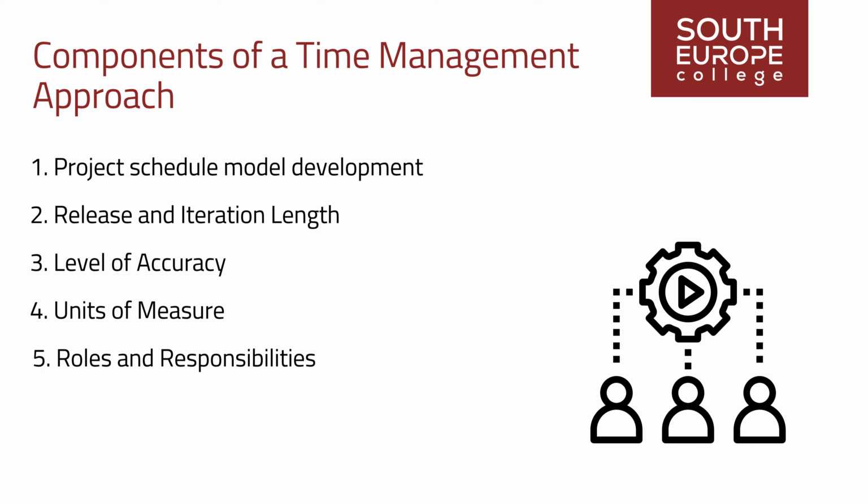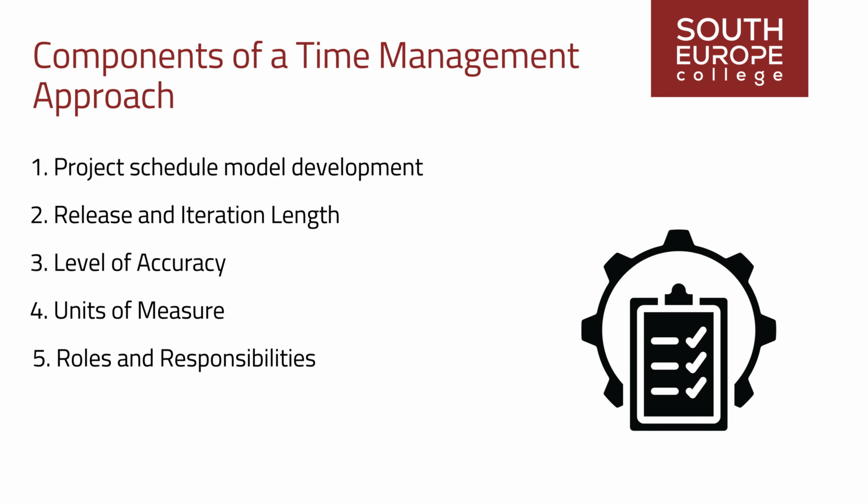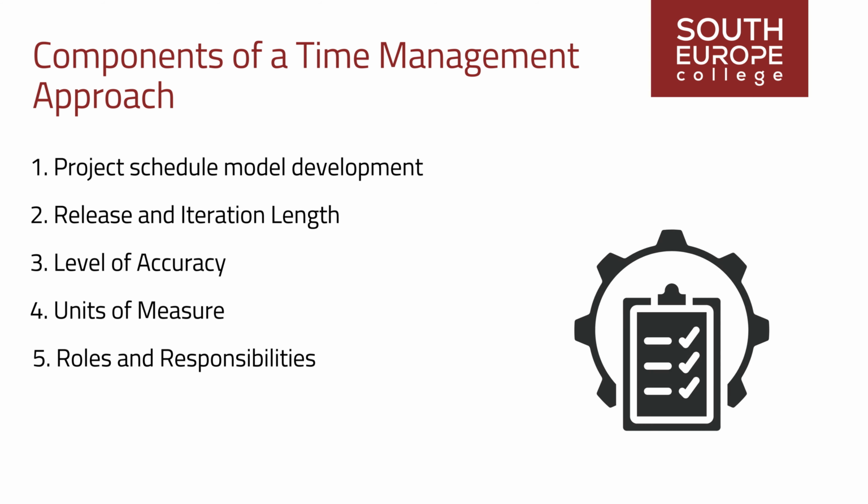5. Roles and responsibilities. Identifying the main roles and responsibilities for developing, maintaining, and managing the schedule. While the project manager bears the overall responsibility of developing, maintaining, and managing the schedule, several project team members could have roles within that. For example, estimating activity duration might be assigned to team members performing the task, or gathering data and generating performance reports from project management systems could be assigned to a specific team member.